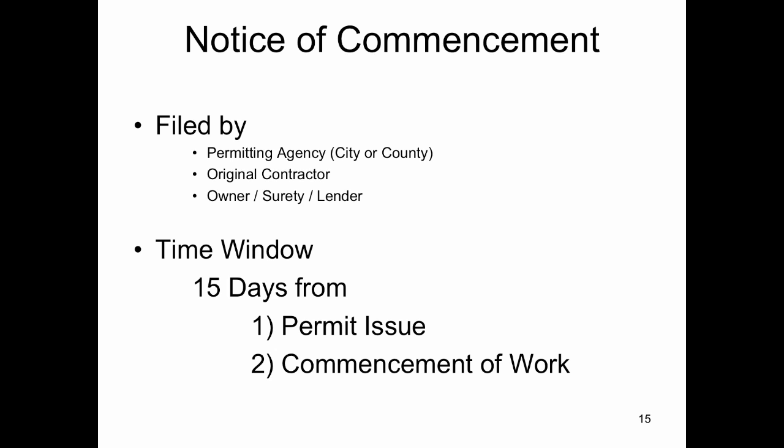A notice of commencement. This is filed by the permit agency, the original contractor, or the owner. The notice of commencement should be filed within 15 days from permit issue or commencement of work. This type of filing is intended for government contracts only.